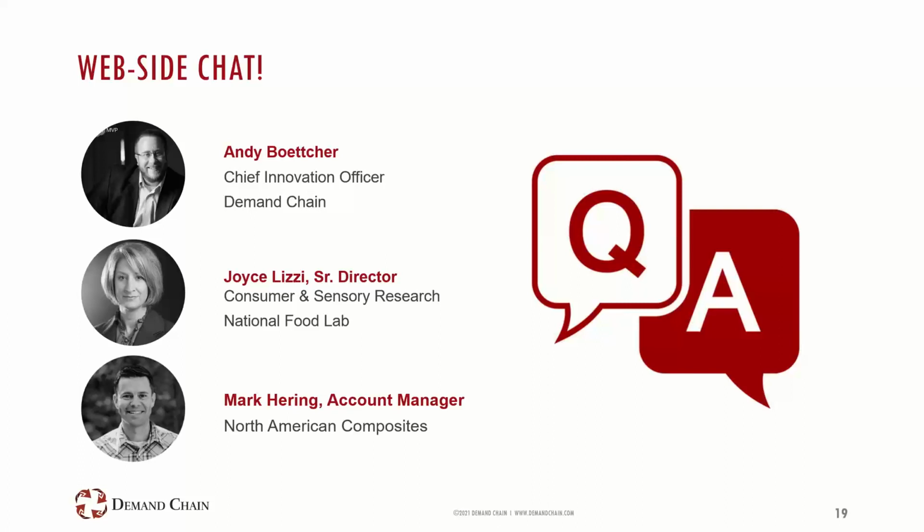But sometimes reality happens. We put something into the wild and an unexpected condition comes up. Actually, there was one time, I don't remember which platform it was, but the platform was acquired by another company like 6 months in to go live. And they increased the rate by 2x of the cost of the platform. And that was enough at the time to say, okay, we should look at something else. I remember that was one example that was probably 2-3 years ago. But again, short answer, yes. I would not take that lightly though.